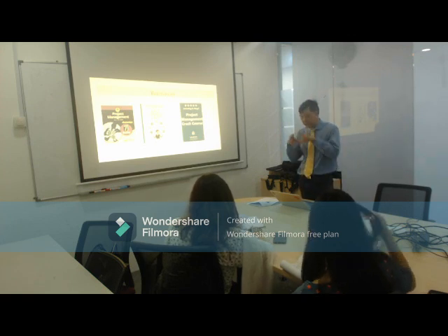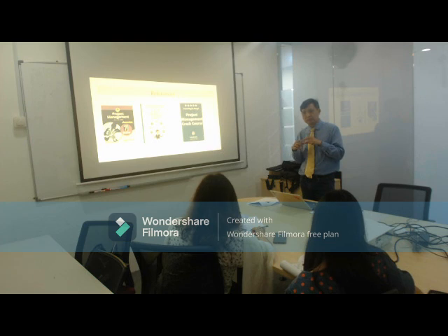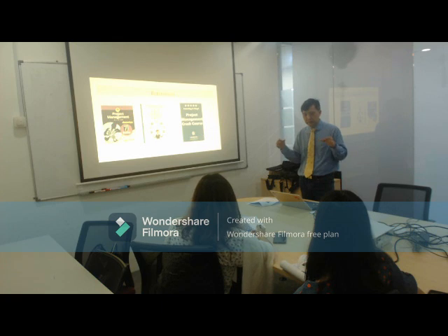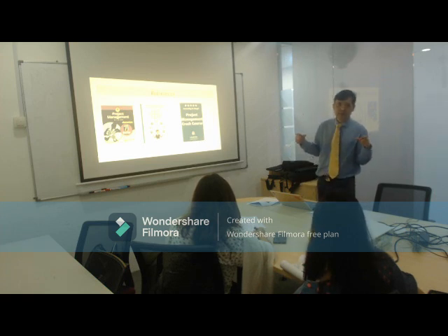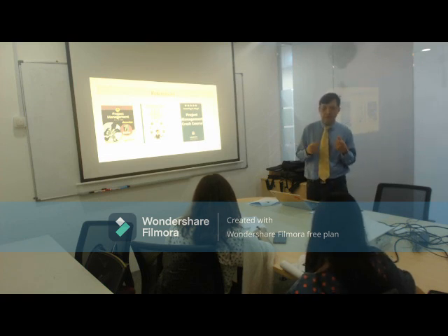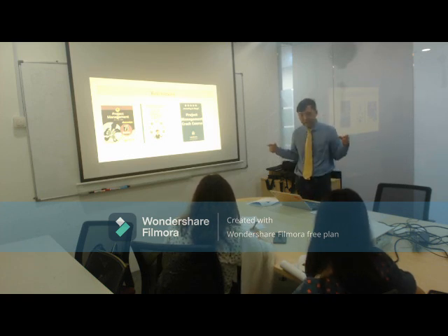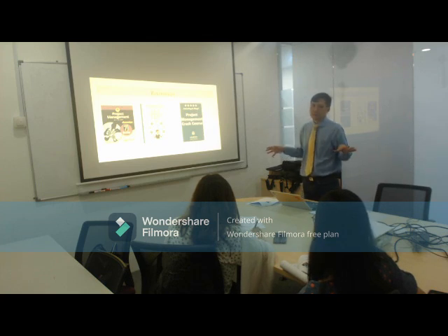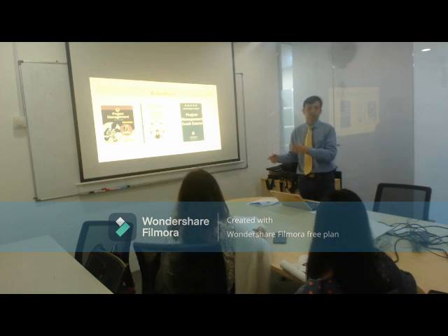Another very important document for finalize is this. After all those things we've done, one important thing is a document known as LL, lessons learned. Although it's not a requirement, a professional project manager will prepare it to say that this project was completed, but during this project, this is what we learned.